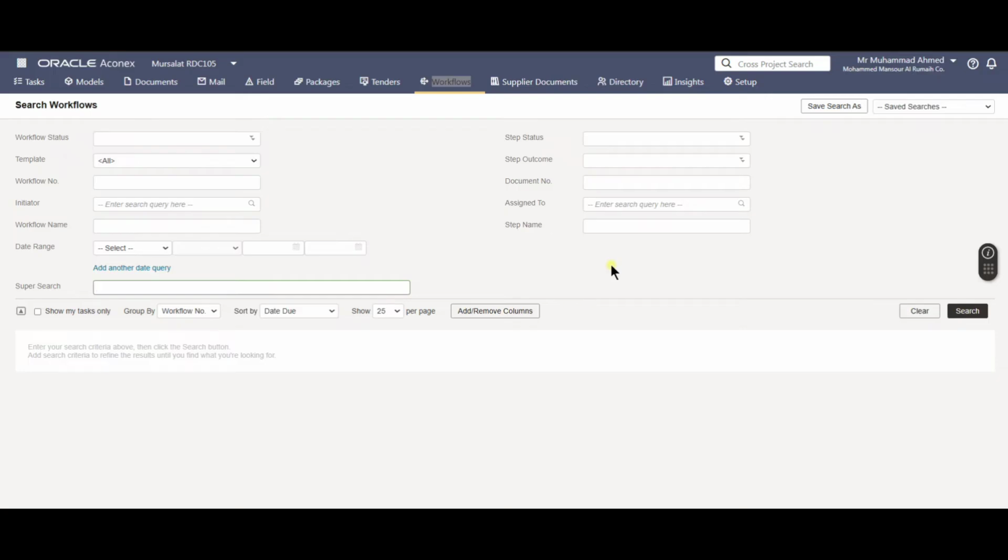Even if it is a big project, then based on the subdiscipline, you can define the teams that these people will be reviewing this type of document, and then we assign a number of days within which they have to review. While searching in workflows, we will be able to know how long a particular type of document took to complete the process.